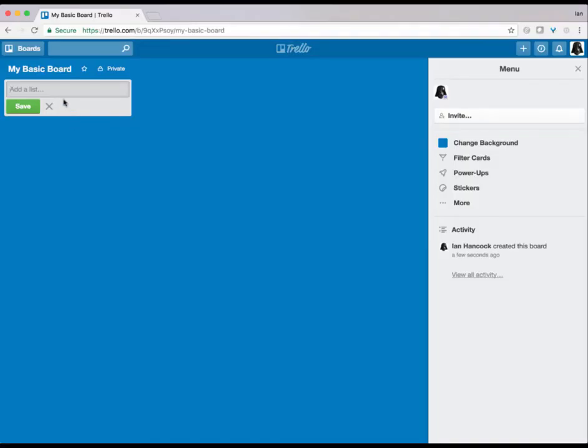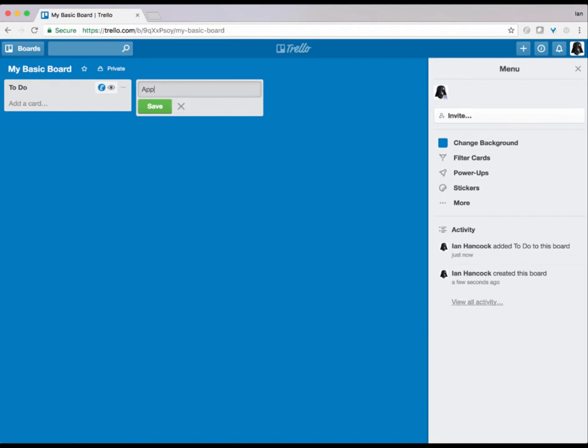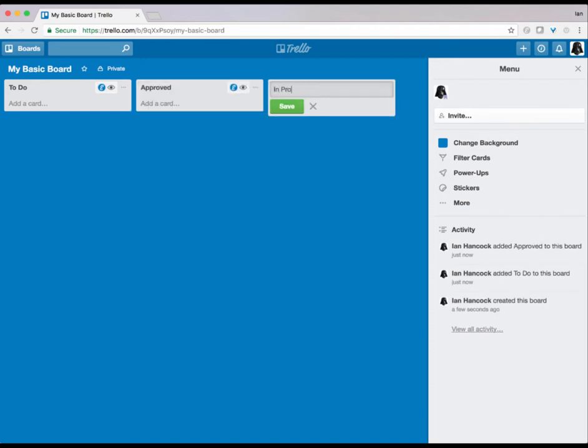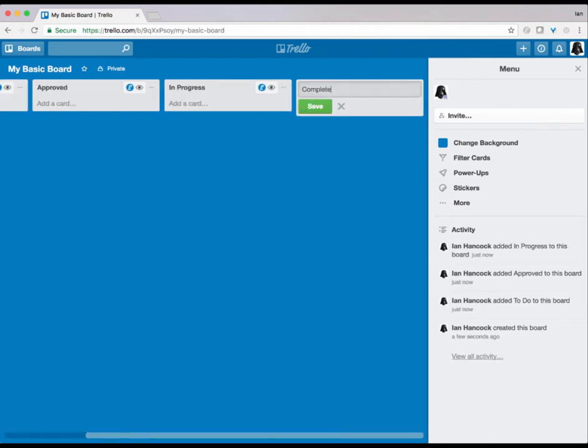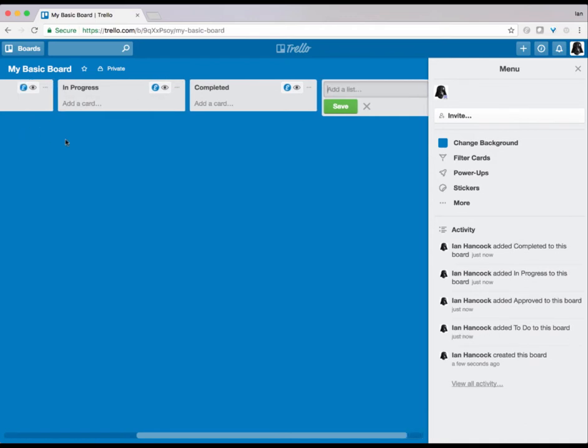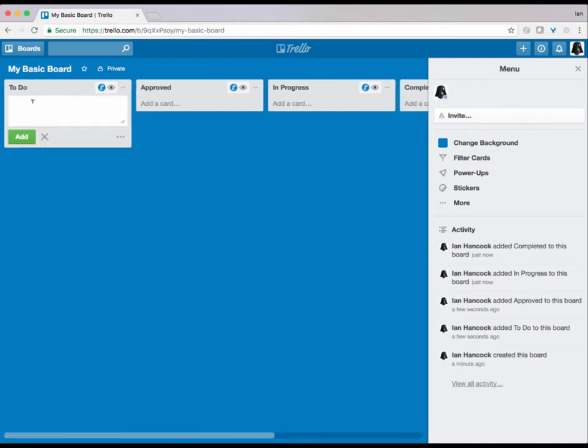Moving very quickly on to what Trello is. Trello.com is where you go to get access to Trello boards. Again, you'll create yourself an account and you get some free usage. If you create yourself a board in Trello, what you essentially get is the ability to add multiple lists. So for instance, in here we could have a to-do column, in progress column, and a completed. Very simple. And what happens in here, you add items to the list.